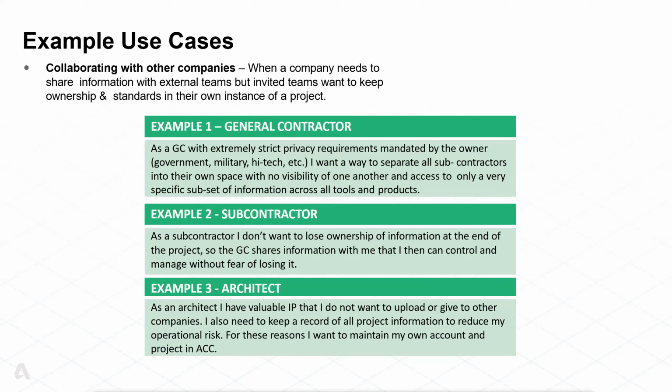In the instance of some particular projects with really strict privacy and security requirements, where you want to create ACC sites for all of the different subcontractors, so everybody's separate. There's no shared folder system where everybody goes in. This allows the subcontractors to access the information that you only want them to see as you share that across Bridge to their specific sub-project in their account.